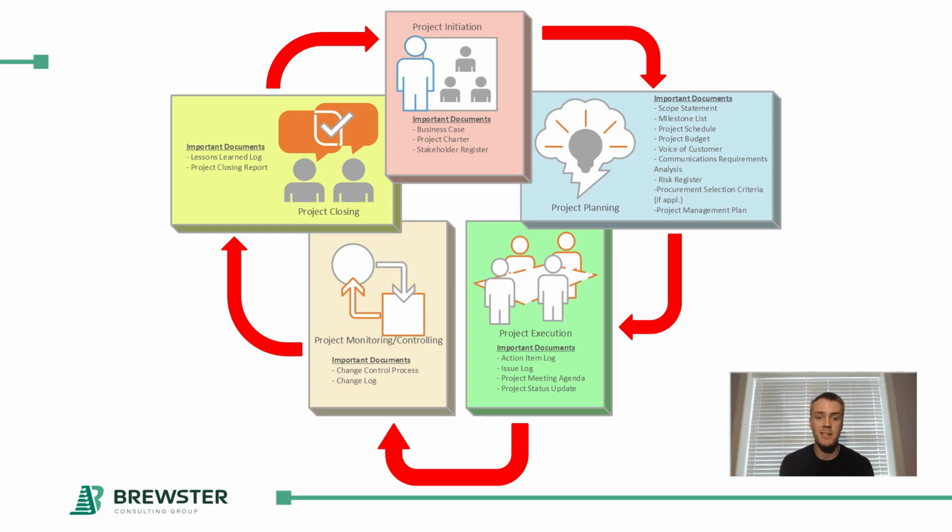Your change log just details out the changes that have taken place and contains information like the actual change itself, when that change was introduced, when it was approved, and who authorized it.